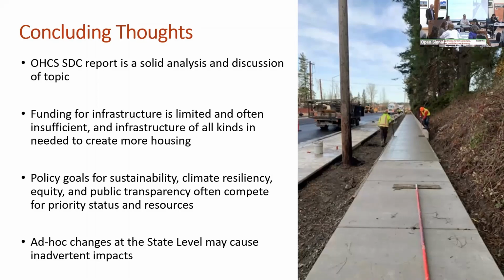On the first one, moving collections from your building permit to certificate of occupancy is the example I used. It's just the finance cost to carry from that point in your construction process to whenever you occupy. I use 2 years and $2 million at 6%, or $120,000. Certainly helpful, but that's sort of on the margin.